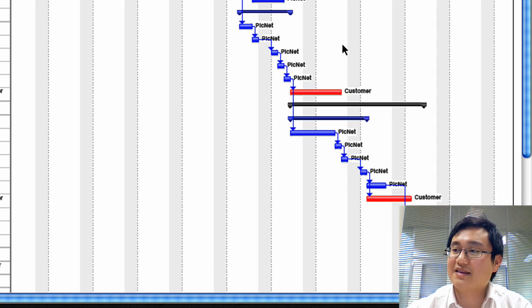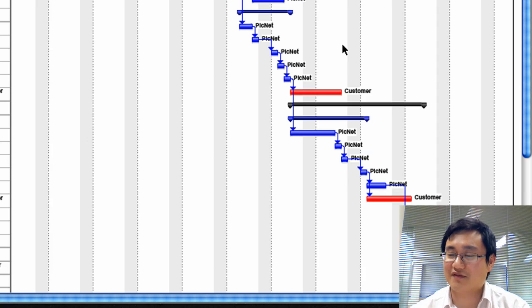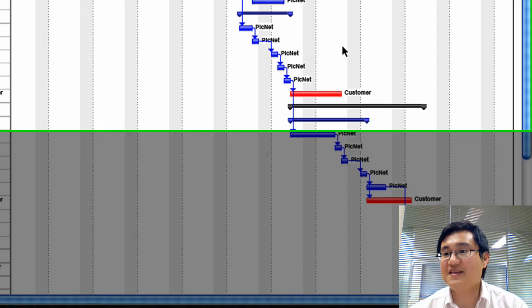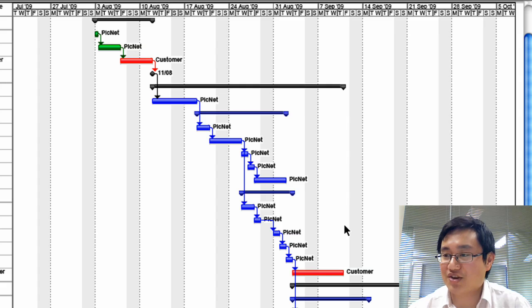Time is allocated at the end of the second and subsequent development phases to implement any changes required as a result of the customer review. In this example project, we have 2 iterations of development over a period of 6 weeks, where we increasingly add new features to the developing system until all of the functional requirements have been developed.